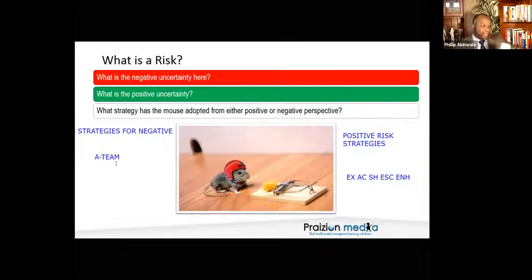That is not mitigate. The difference between mitigate and accept, whether passive, active, whatever, mitigate is taking action before the risk occurs. You're doing something to reduce the impact or the probability before the risk happens. All right? This is a very important concept. If all you're doing is saying, oh, if it happens, then we've got money. If it happens, then we've got a plan B. That's just accept. Because you're not reducing, you're not transferring, you're not doing anything.